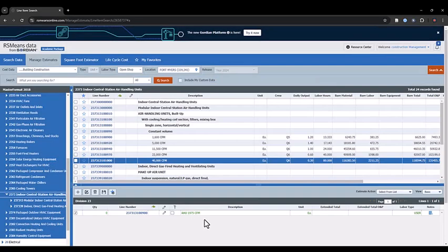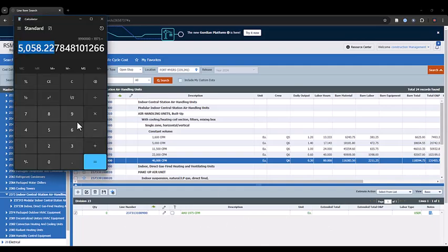Okay, so doing it like that, you can adjust the cost of that. Oh, my bad, it should be the opposite way. So we have 6243.75 multiplied by 1975 divided by 1600.